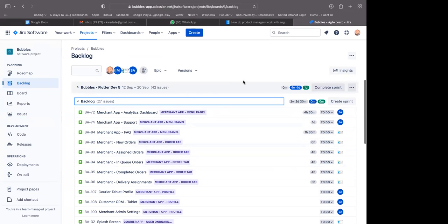And then we look at the reach, the impact, how much it takes, the engineering effort. So if it will take much longer, do you have the capability? Do you have the resources, right? Those are going deeper and assigning numbers to them. So if you assign numbers to them and it scores itself out, we can come up with a scoring modality that tells us, okay, this feature has a higher score and it's a higher priority.